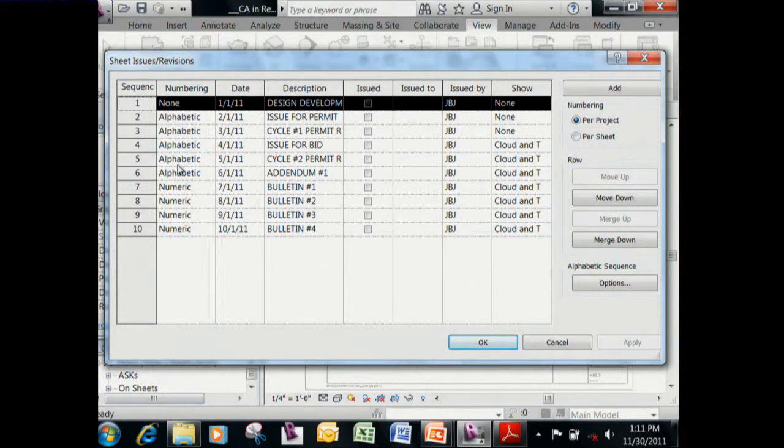And the reason I like to do that is because at Gensler, with our particular standards, we have one bulletin form that addresses items that affect cost or items that require a contractor to submit a proposal. But everything is basically a bulletin. So if you start numbering once the contract is issued, then your bulletin numbers will correspond to the numbering sequence.